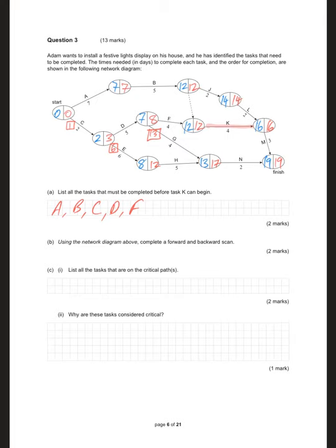So this is tricky here, because you've got 2 possible critical parts up through there, or through the dummy link through here, and there's not going to be a box number along here, because 12 take 0 is 12, 14 take 2 is also 12. So just take care here, follow all the rules, you'll be right.